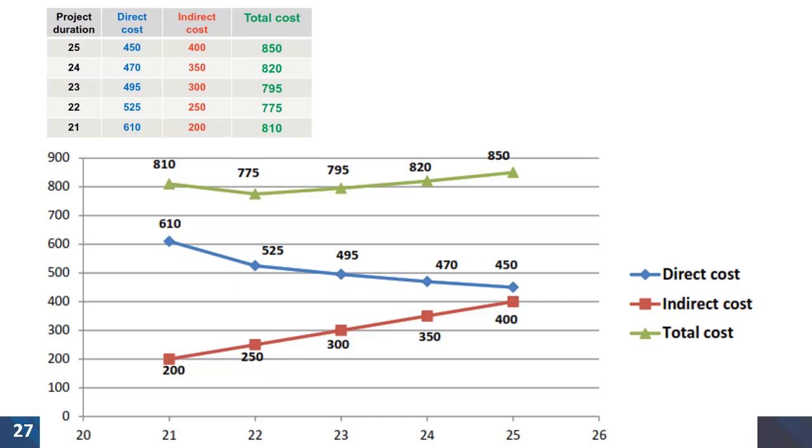We can plot and now the total cost is increased to $810. This is when we stop crashing and reducing activity duration. The graph shows that the optimum duration is 22 days with the associated total cost of $775.